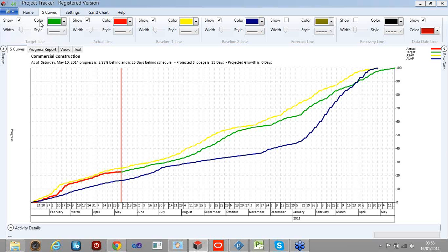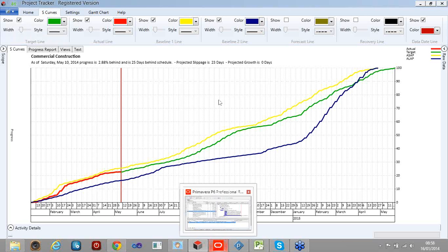Hi, Vijay. How are you doing? I'm good, quick question. I would like to check if there's a possibility for P6 to be able to select directly the baselines from P6 instead of detaching and creating that as an XER. No, the XER file doesn't contain baselines. But how about directly accessing from the P6 database? Well, that's using the SDK. So if I use the SDK, I can directly access the baseline, so I don't need to restore, right? No, you don't need to restore.